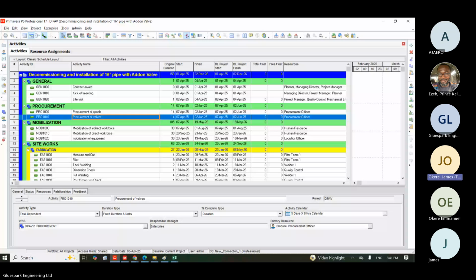But within you, you can say, okay, since these guys have worked 2 days or 3 days and they achieve 20%, how can they work 1 day to achieve 60%? You can within yourself just add 20. Instead of updating what they have given to you, you will add 20. Then the next day, you try and go to site. You can add it and send your report. Then you can now go to site to validate what they said. Then if it's true, you update fully in the next report you will send.